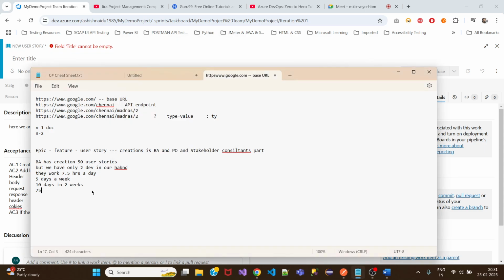So it's 75 hours of dev work that a BA should consider in adding user stories to one sprint.